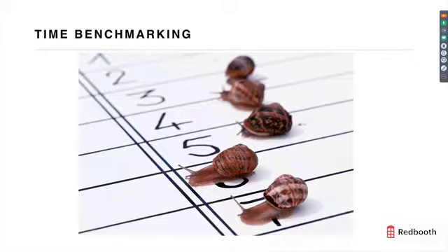For example, let's say you know that the design process for a website takes a large chunk of time overall, and there's a lot of back and forths, getting drafts approved and tweaks to the design. So in this example, your average design process for the website takes around 6 weeks, and you can account for that in the Gantt chart. And if you know a certain task, like let's say taking the visual inventory, takes 3 days and requires one of your workers, you can extrapolate the hours and the labor costs for that particular task.